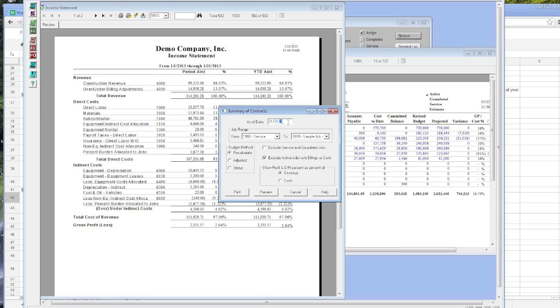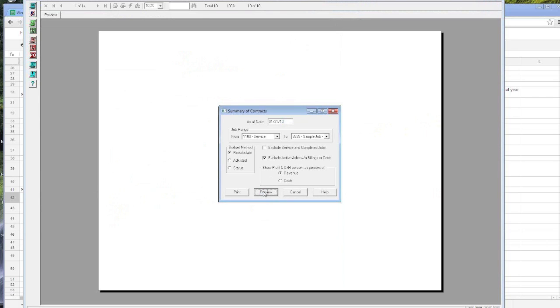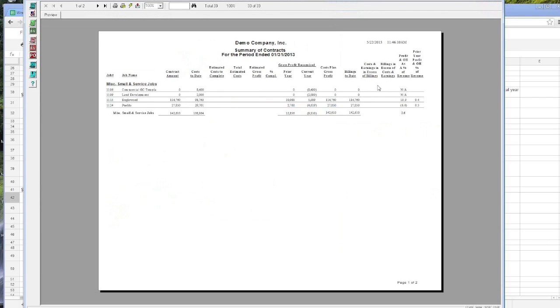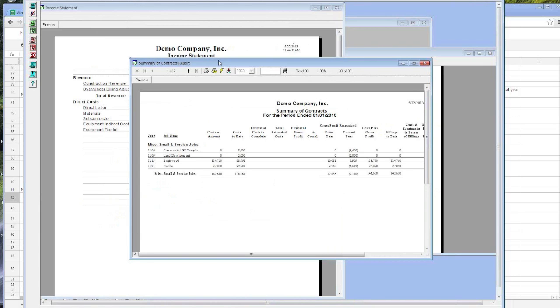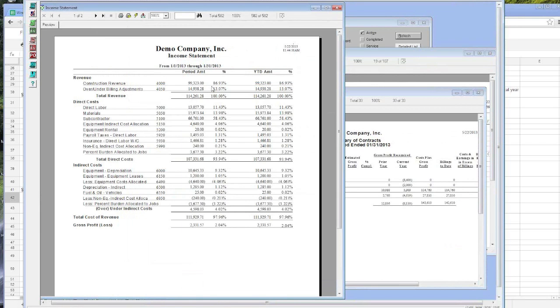So in Accounting 101, first class in college, first 2 weeks, they teach you about the matching principle, which is crucial. In construction, they don't teach you much about construction accounting, but they'll teach you about the matching principle. And this over-under billings concept is all about the matching principle. The concept behind the matching principle is that if I look at my income statement and my costs and the margin on those costs match my billings, then I've got an accurate financial statement.